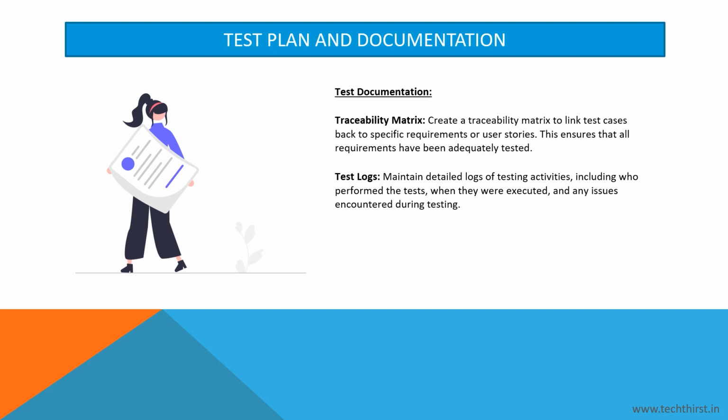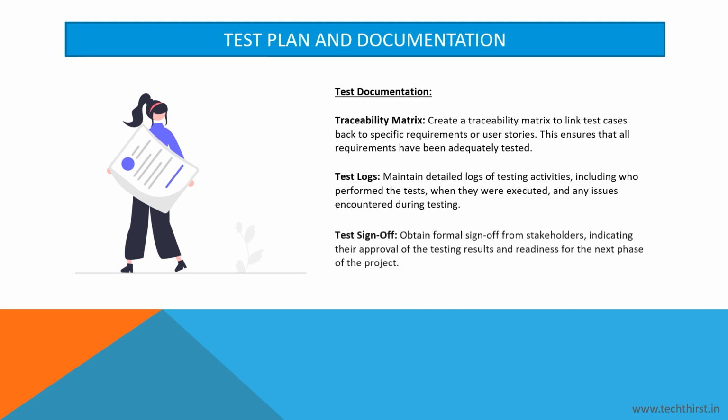Test logs. Maintain detailed logs of testing activities, including who performed the tests, when they were executed, and any issues encountered during testing. Test sign-off. Obtain formal sign-off from stakeholders, indicating their approval of the testing results and readiness for the next phase of the project.